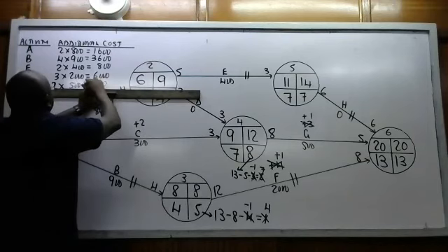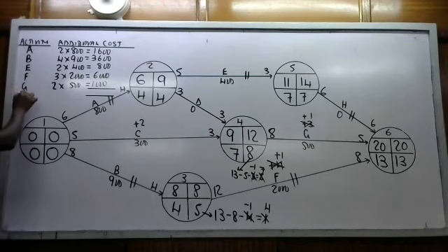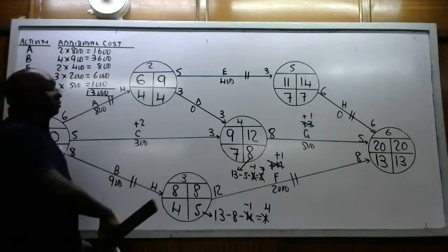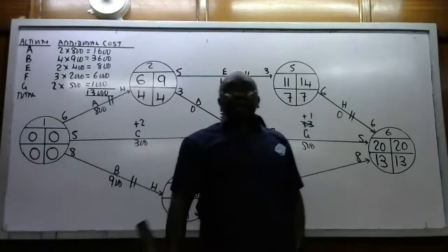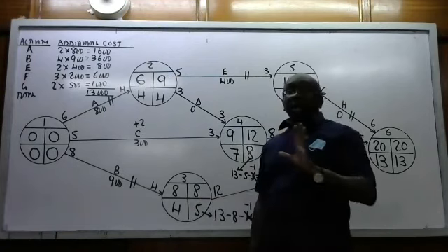So our extra costs from the total, that is 1,600 plus that 600 plus 800 plus 6,000 plus 1,000. That is 13,000. So that is the additional cost. So we are okay.